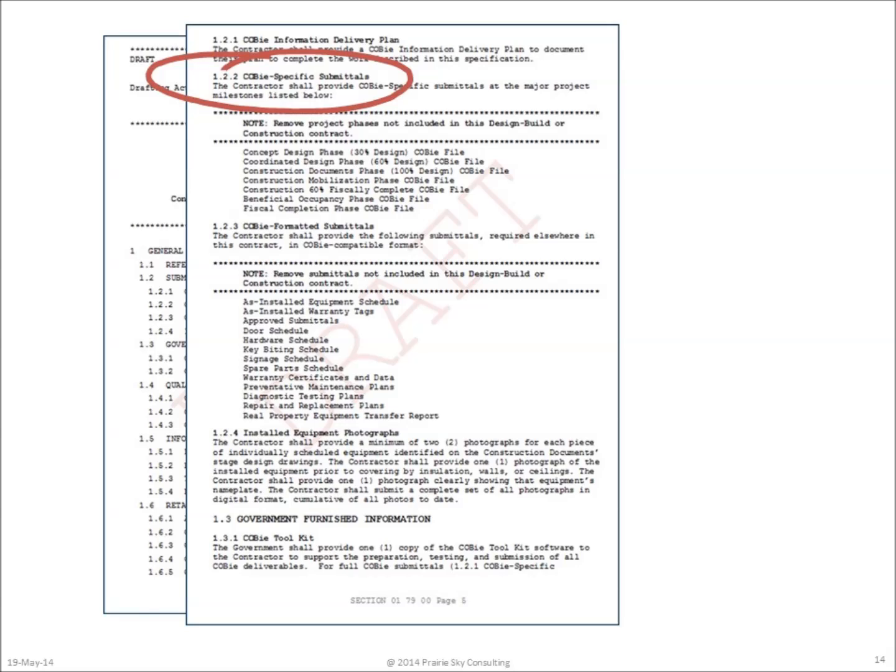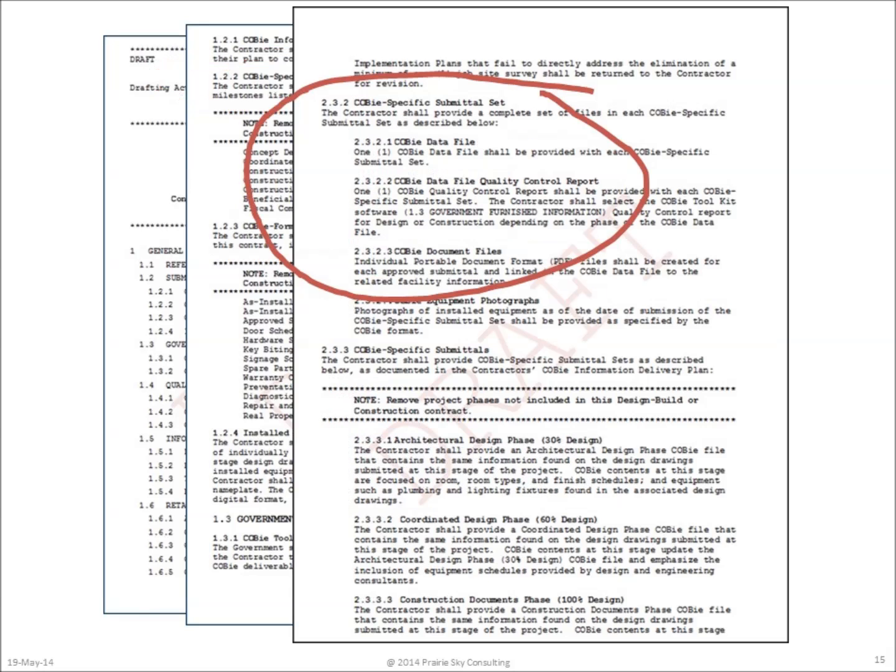In this specification, COBie-specific submittals are required any time the designer delivers paper drawings. There are three components to any COBie-specific submittal set. The first is the COBie data file. The next is the COBie data quality control report and any documents identified in the COBie file itself.